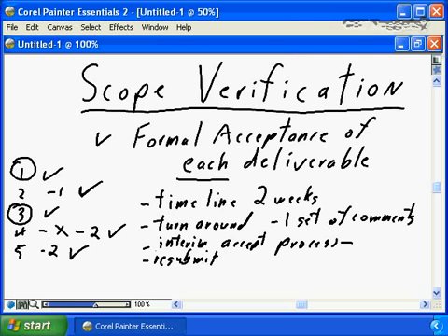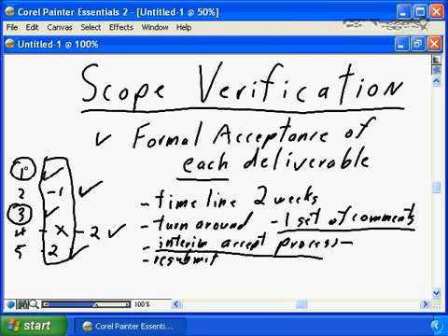The importance of this interim review process, very much like the importance of getting a single set of comments, is it prevents change and rechange and rechange and rethink. If you made these first set of changes on the first submission and the whole document was open for review and revision, section number 1 may require changes this time, or section number 3 may require changes this time. So you make the changes, you resubmit, and somebody reviews it again and says, no, that's not quite right. I guess my first thoughts were correct. I should have gone with my first intuition. It should be back to the way that it was.